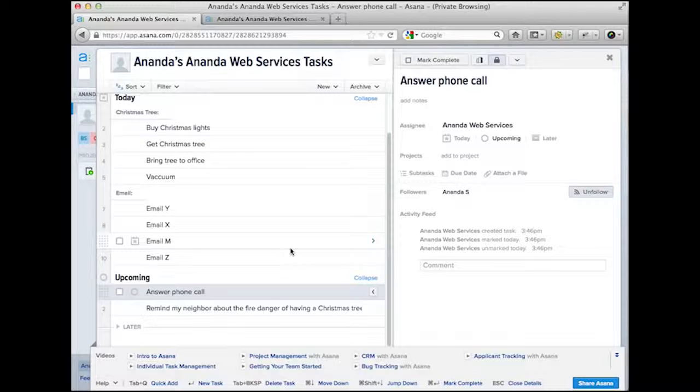And then the project manager, and actually anyone who has access to the complete project, can see how things are coming, and you can see, are the due dates that we set up for these different areas, are they being met? Does the design look like it's going to be finished on time? Well, you see, yeah, it's supposed to be finished by August 6th, and now it's mid-July, and we have the first draft finished, so we're still on target. You can do all of that.